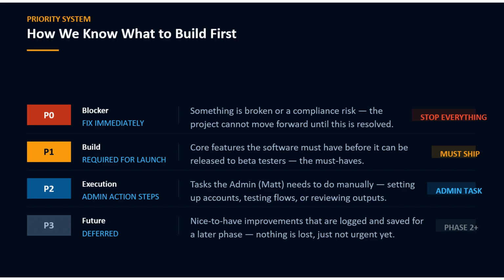In fact, everything gets blocked until you get that resolved, because that could be a real showstopper, like a compliance issue, or the fact that we need toll gates to put discipline in before we just start building things and having to do too much rework in downstream application development. So sometimes blockers are needed to fix things. They become real high priority, immediate. Now, literally stop everything and fix this before we go any further. Toll gates and compliance issues might be two examples I ran into.